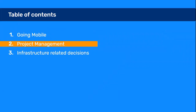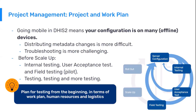Now let's focus on the project management, budget, and planning implications. All projects are different in terms of amount of resources, budget, size, and settings, but it's important to follow a guide to reduce risk and future problems. Begin by planning the testing. We divide this process in four steps: server configuration, internal testing, user acceptance tests, and field testing. All of these must be planned from the beginning in terms of work plan, human resources, and logistics.